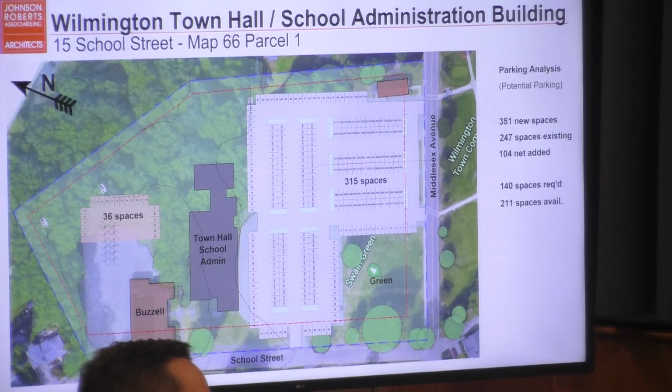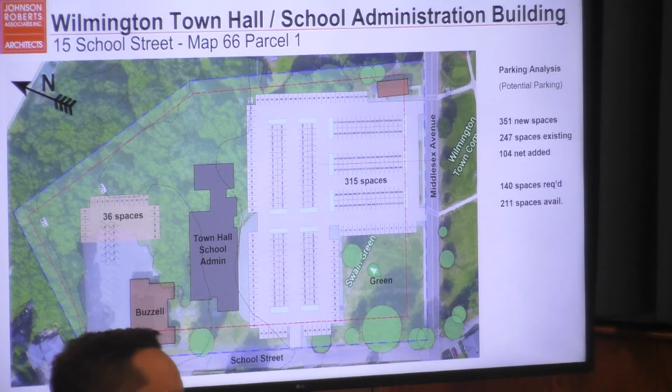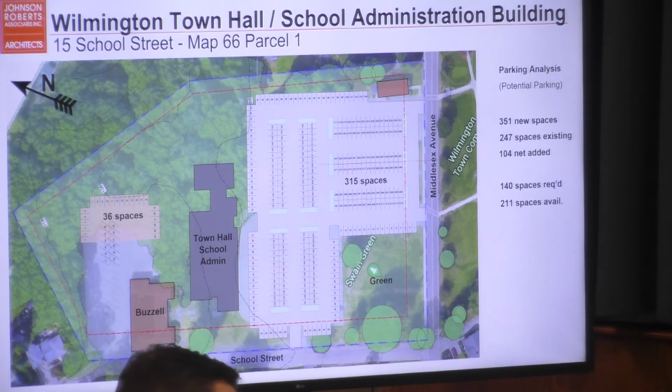And this is, as he said, a test fit, so the actual design will change. We have to go before the planning board for site plan review, so this is just demonstrating that we have more than enough space to fit the town hall, keep the green, which was a request of the selectmen's meeting, and make sure there was adequate parking for students, and adequate space for the 4 or 5 events that crowd this site on a weekend or week, like a carnival. I think we're demonstrating that can easily occur on this site. That's great.